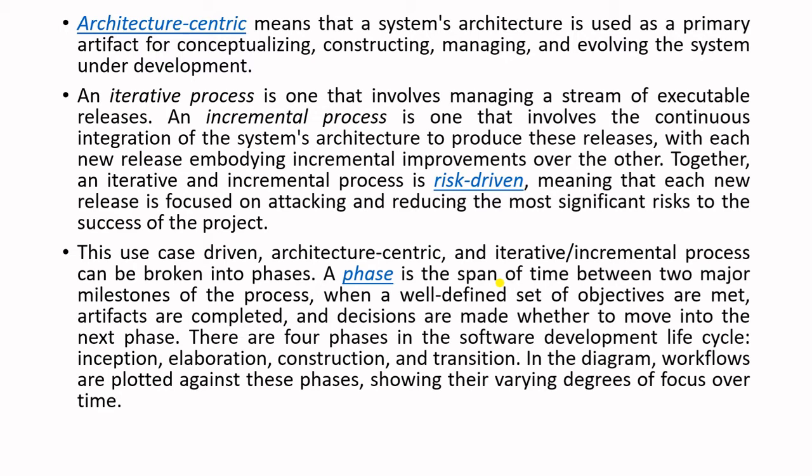Next, this use case driven, architecture centric, and iterative incremental process can be broken into phases. A phase is the span of time between two major milestones of the process when a well-defined set of objectives are met, artifacts are completed, and decisions are made whether to move into the next phase.